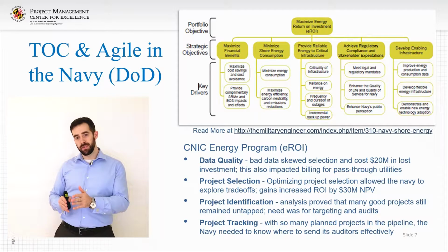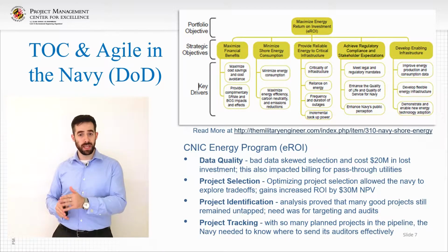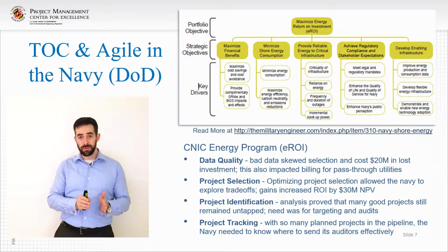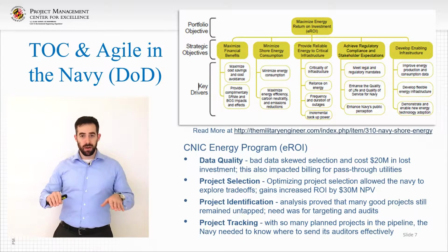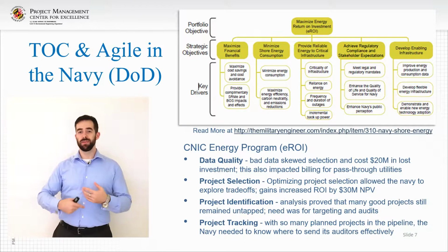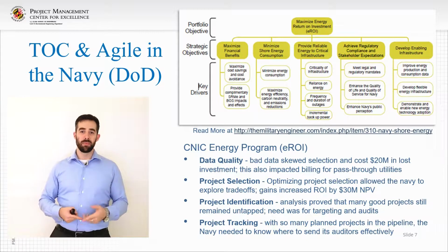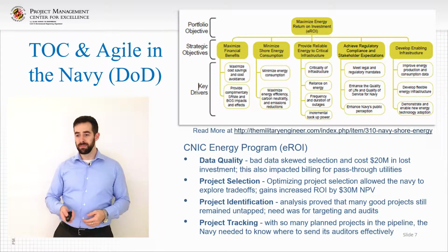We were constantly identifying what was the number one thing that we needed to improve, and as the constraint on the system moved, we then focused on that constraint and subordinated all other processes and lifted. So we went through the 5 steps of progressive ongoing improvement.